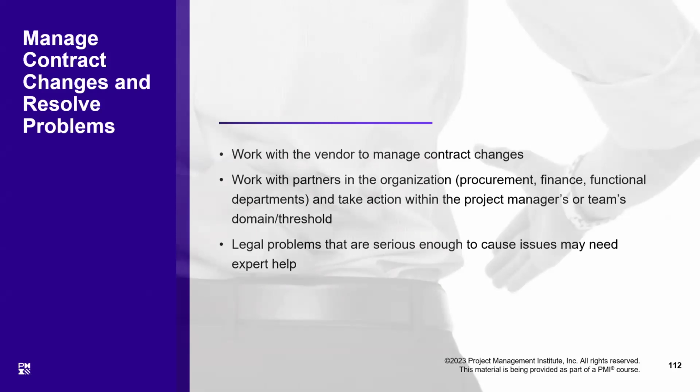If anything has to be changed in the contract, classically speaking, it must be defined. The mechanism of bringing any change to the contractual terms could be properly defined in the contract, right? So it doesn't remain a subject of the change control board. It then becomes a subject of the contract change control mechanism, right?